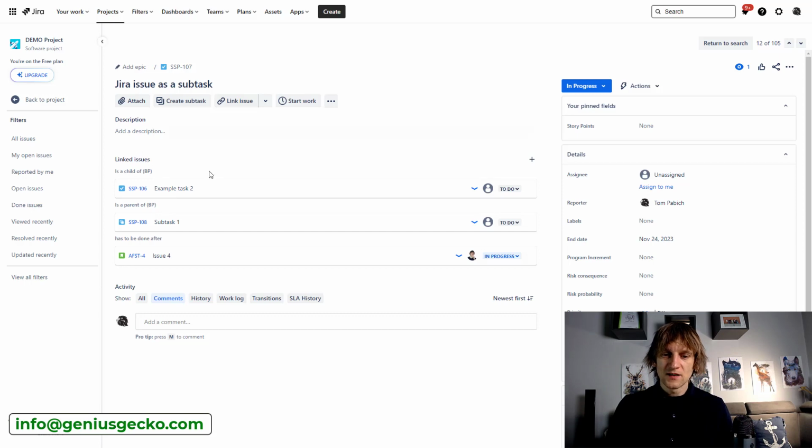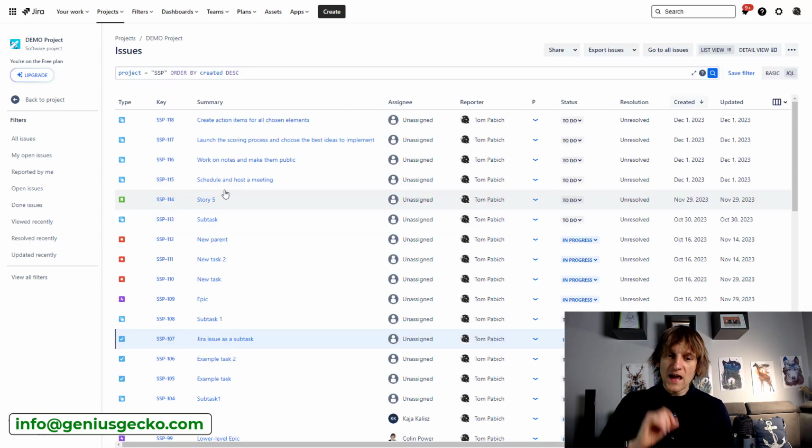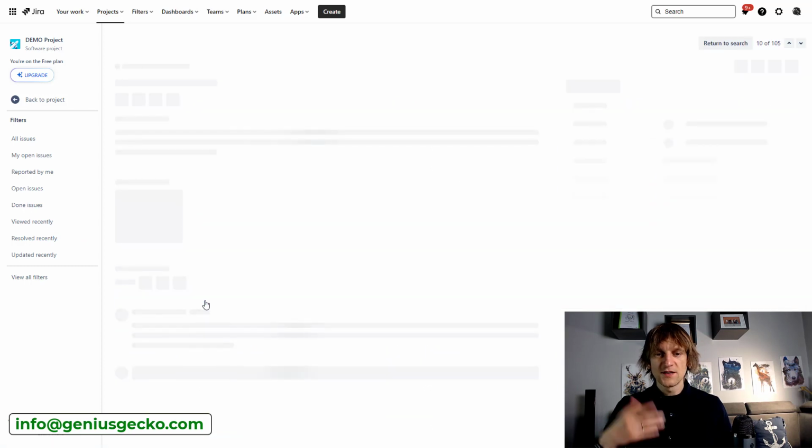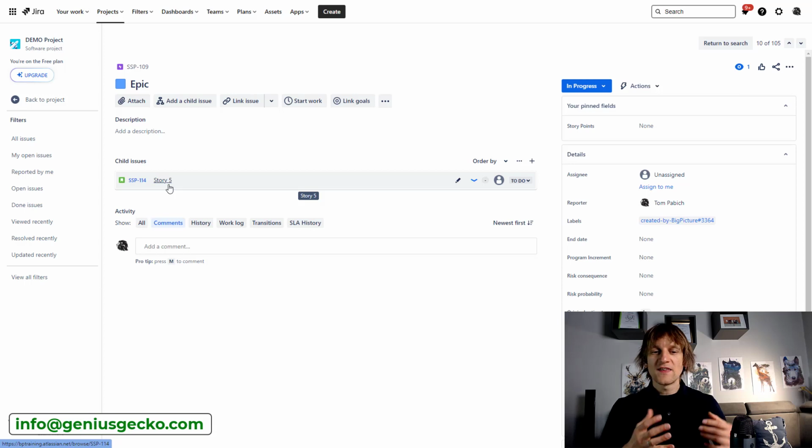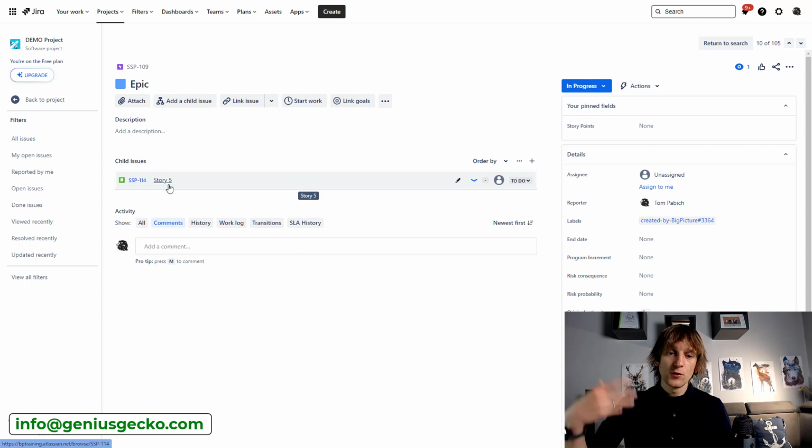Something that it might sometimes be confused with are epic links. If you look at an epic, which is named epic over here in my instance, you will see that epics have a section called child issues, and those issues in this section will also be connected to an epic with a link, but it's a different type of link. I know it's a little bit confusing, but it is how it is. Epics are kind of special in Jira, and they have this special type of link called epic link, which you can use to connect or hook up elements under the epic, right? So if you use the epic link to connect a user story, for example, to an epic, it will be in this special section called child issues.